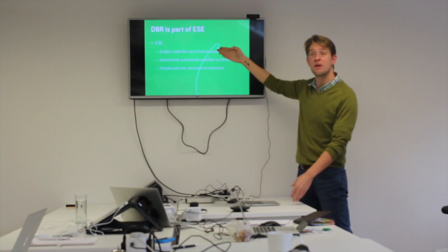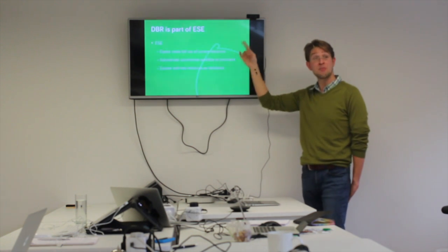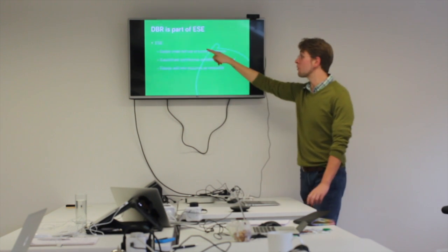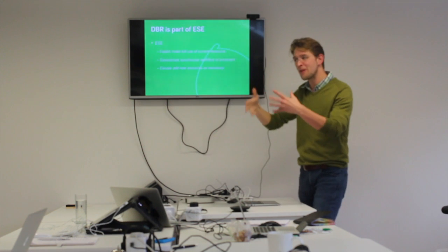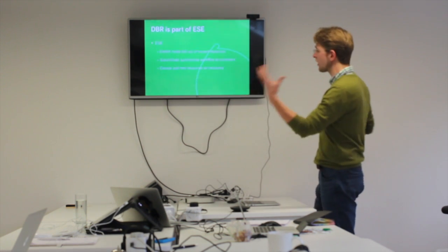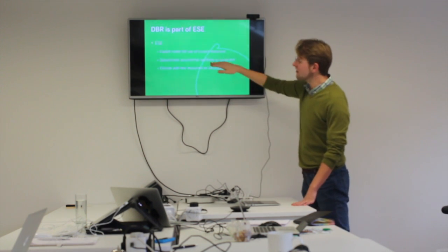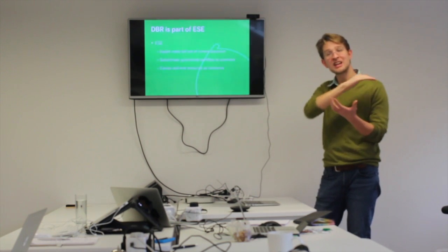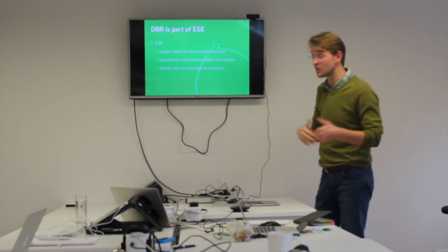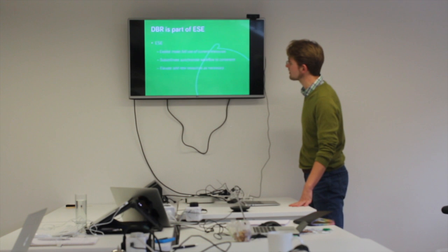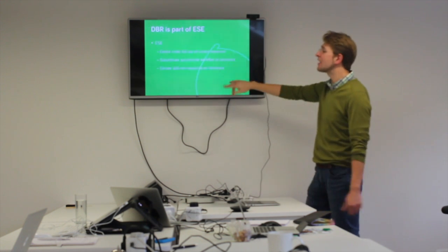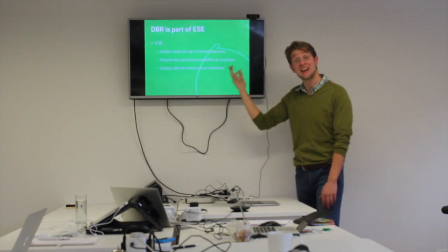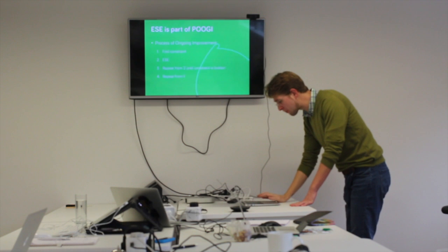Actually, you should start by exploiting and saying, are we making the best use of the resources we have? That would mean asking, what's the bottleneck of this work and how can we get people to prioritize it? Then the second thing, the subordinate, is the process of saying, can we make the flow smooth, so work in progress isn't piling up? And then finally, we talk about adding new resources.